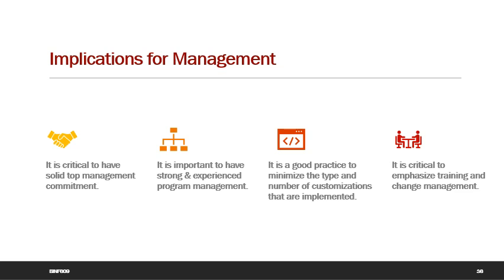In order to reduce the chance of unexpected and unpleasant surprises, it's good to minimize the type and number of customizations that are implemented, where any change is a chance for unexpected surprises and increases the chance of risk becoming reality. It's also important to empower team members.